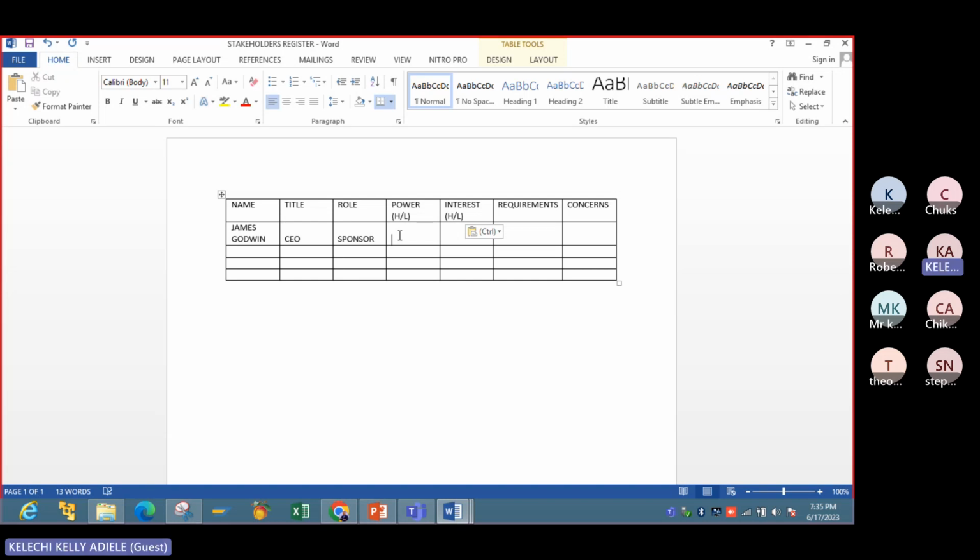All right, fine. So we are actually coming up with a stakeholder register for our project. We have this as title, sponsor. The power is high, the interest is high. So he's supposed to give us the BRD. Are there any concerns? Our concerns are basically access.